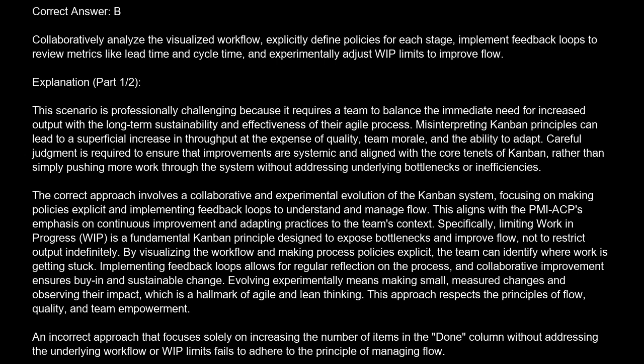This aligns with the PMI ACP's emphasis on continuous improvement and adapting practices to the team's context. Specifically, limiting work in progress, WIP, is a fundamental Kanban principle designed to expose bottlenecks and improve flow, not to restrict output indefinitely. By visualizing the workflow and making process policies explicit, the team can identify where work is getting stuck. Implementing feedback loops allows for regular reflection on the process, and collaborative improvement ensures buy-in and sustainable change.